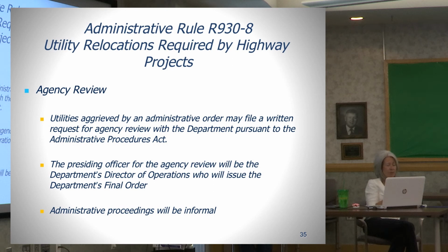Again, the rule is speaking to the department and the utility companies directly, not to the consultants and the contractors that work for UDOT. So it becomes pretty necessary. There's a process that contractors have to follow with respect to the old specs and the 2017 specifications. If there's a potential excusable delay taking place on a project, in addition to the requirements of coordinating with third parties during the baseline schedule and the baseline schedule update meetings,